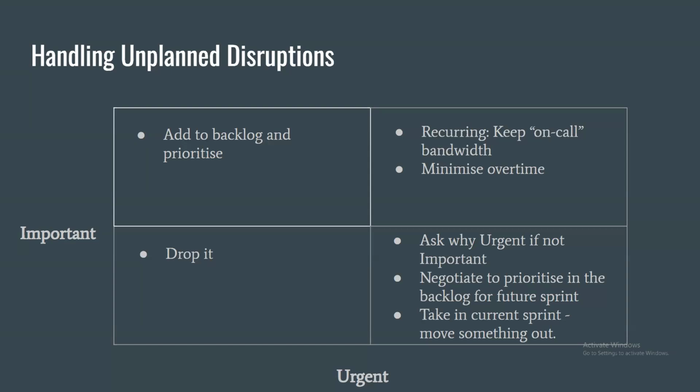Like if you have a customer who is willing to maybe renegotiate certain things because they are suggesting a change, then you will look at, is that change really important? And then you will present that if we take this change, the cost will increase by this much. So you always collaborate with full transparency rather than gaming the system and trying to get things done maybe by hiding the cost or hiding the effort part, or maybe lowering the quality on certain things.